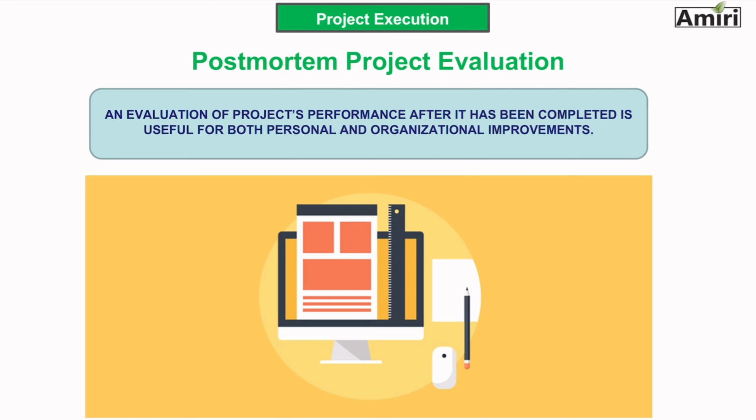Usually within companies, especially those that work on platform products, complex products, customized products, variant products, a post-mortem project evaluation is done. They do a couple of things from this. One good piece of information is they can develop a better timeline, so they calibrate their time estimate.